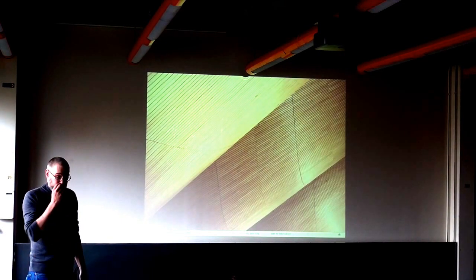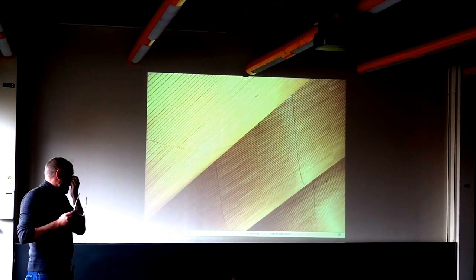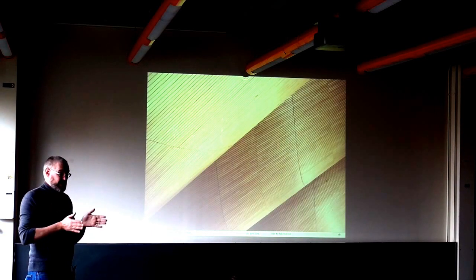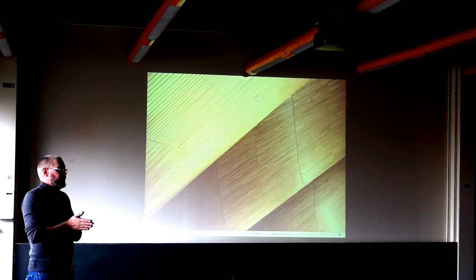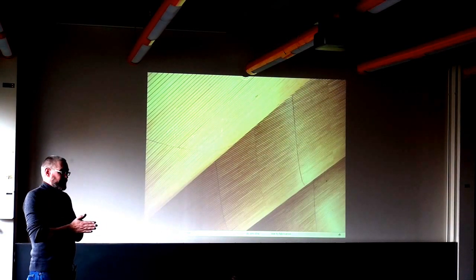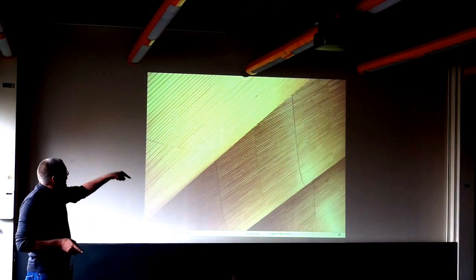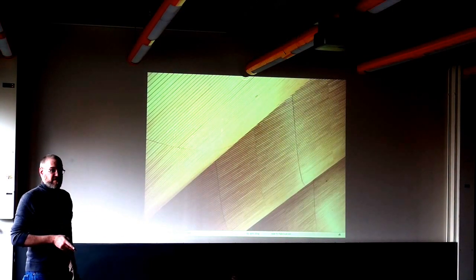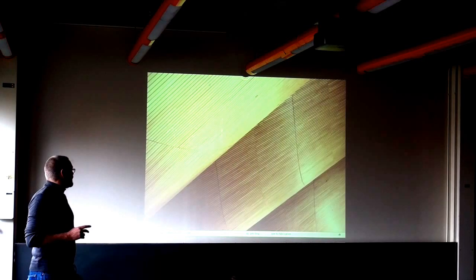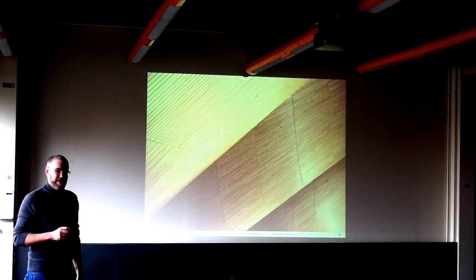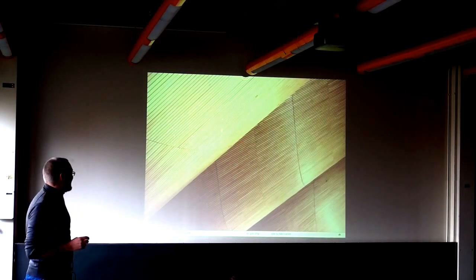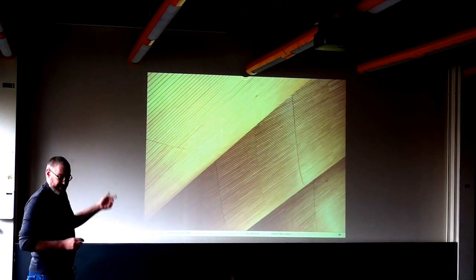It went out pretty well. The architects were a bit disappointed in the first place, when we came up and said we can't assemble this on site. We have to prefabricate in elements, which means you have those lines in the other direction every 7 meters or so. A sort of disappointment, of course, but then it was luckily possible to explain why. And I think it still looks pretty good.